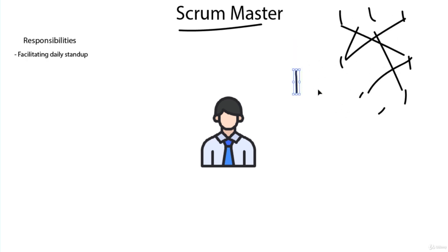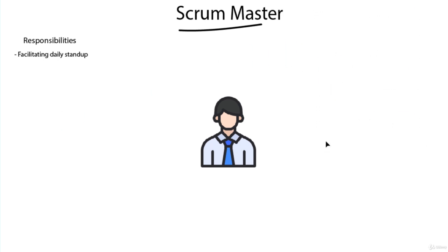They can kind of just sit on the edge, and then if something needs to arise, they say, okay, guys, let's move on. He or she's just sitting on the edge. The Scrum Master is doing that. And in all honesty, if a daily stand-up is working effectively and a Scrum team is working effectively, the Scrum Master doesn't even need to be involved in some meetings, and the daily stand-up should operate properly. So that is one of the tasks, is they facilitate it. They do not run it. They facilitate the daily stand-up.